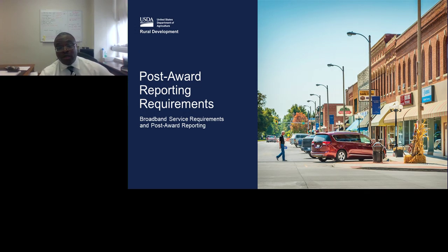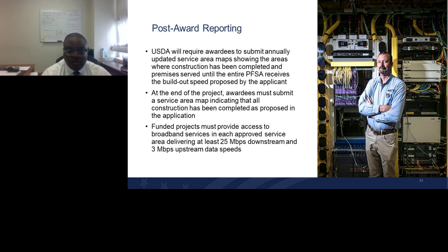Post-award reporting. We have a number of post-award reporting requirements that were included in the FOA when the FOA was released for the ReConnect program. I think many awardees are familiar with this, but we will also mention them again: we will need annual updates to the service area maps showing where construction has been completed and areas that have been served.